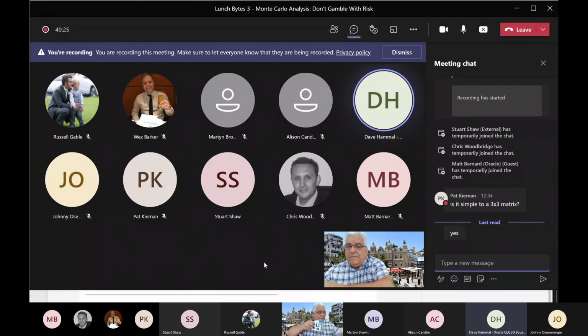Yeah, I'll just jump in there, Pete. So that option that you see on the risk analysis page is to do with the level of detail that is captured. If you've got a very detailed schedule, you might not necessarily want to see the distribution chart for every single activity, right? So you can get it just for level of effort and milestones, or even just the project itself.